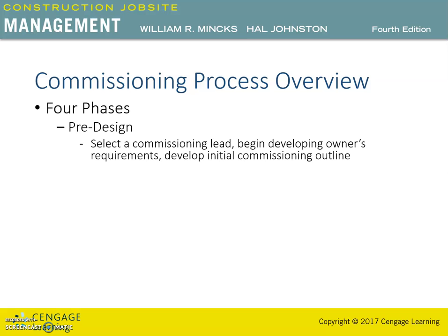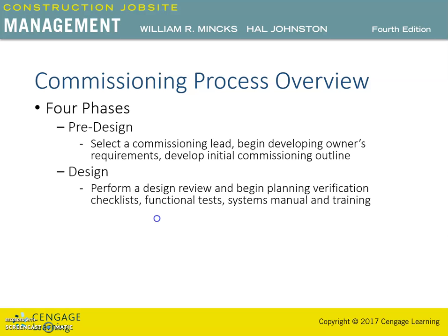In the pre-design phase, certain steps or elements can be incorporated, which are: select a commissioning lead, pre-design phase commissioning meeting, begin developing owner's project requirements, develop initial commissioning plan outline. During the